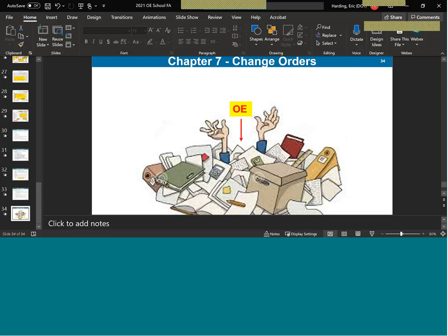I would say also with the MERC 11s for the equipment hours, if you do try to put on your MERC equipment summary sheet a quarter hour, it's just going to round up to 0.3, by the way, just so you know. So that's why when the spec says to the half hour, the MERC equipment summary sheet is designed to reflect that. 0.25 is just going to put 0.3. So always only use half hour increments for equipment.